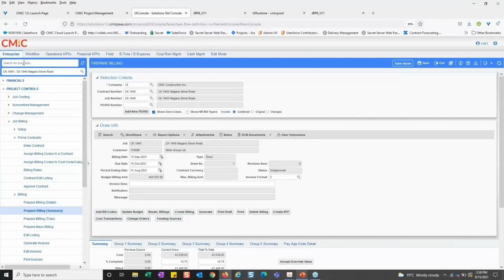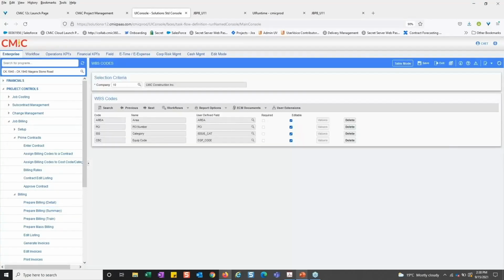So I did a brief mention about WBS when I showed you my mapping code earlier, if you remember. And what WBS codes are effectively an extra attribute that you can add to your cost code category combination to give you more granular information for both job cost, right? I want to capture costs at a very specific area or something very unique about it. I want to associate attributes to it. And effectively why I'm doing that is, yes, I've got good granular cost control and granular cost capturing, but effectively why I'm doing this is for reporting.